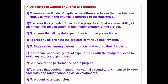To compare periodically — monthly, quarterly, or half-yearly — actual expenditures with the budgeted so as to avoid any excess expenditure. For new projects, what was planned and what is actually going on must be reviewed. If a project had a budget of 10 crore for one year and is going beyond 10 crore, the reasons — fluctuating factors, uncontrollable market factors — for higher expenditure than planned should be studied to measure performance.